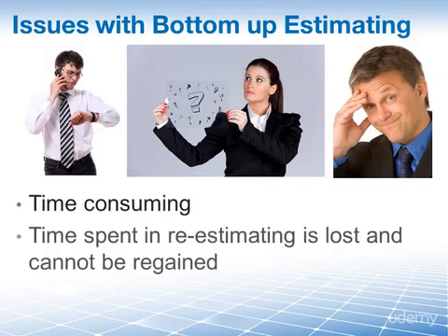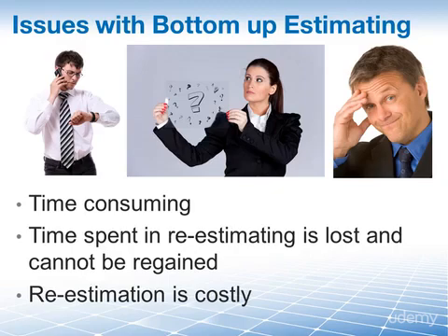As you know, the time that you and your team just spent re-estimating the project cost is lost, and it can never be regained. Re-estimation is also costly. Every hour that you or your team spend re-estimating is added to your project cost, and you probably don't have a budget for that. So how about if you want it quicker and cheaper? In this case, we can use various other earned value formulas and use earned value data to calculate our estimate